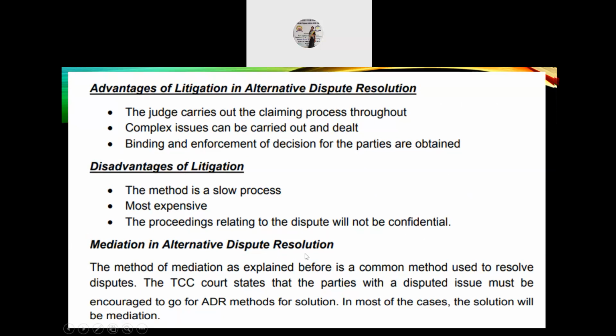Mediation in alternative dispute resolution. The method of mediation, as explained before, is a common method used to resolve disputes, and the TCC states that parties with a disputed issue must be encouraged to go for ADR methods for a solution. In most cases, the solution will be mediation.